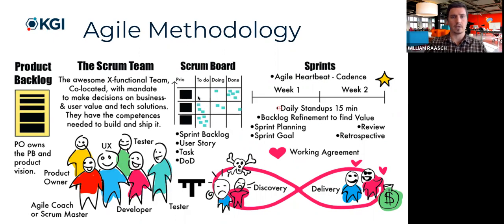Okay. So the Scrum Board is how the product manager coordinates how the iteration runs. They have the list of priorities of what the customer wants, and then they break that down into all the different features they need to do. We're going to practice with this in the next few slides. As they accomplish some of these to-dos, they put them into what's in progress, what's been done, and what has yet to be done. We'll track that throughout the rest of the course as we start working on those.